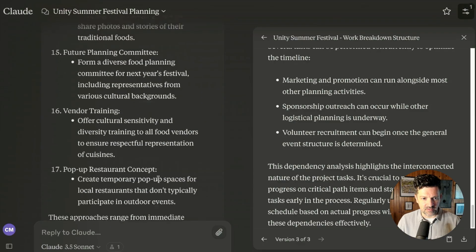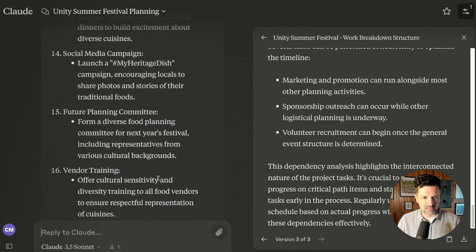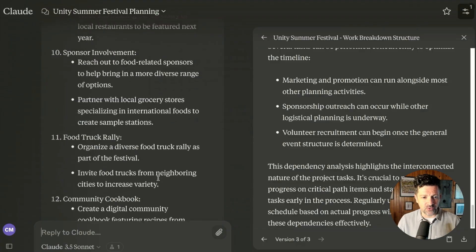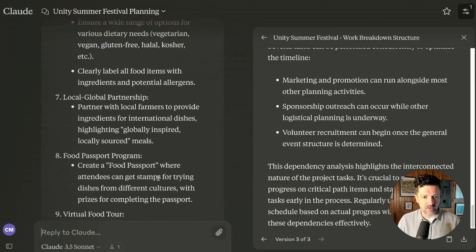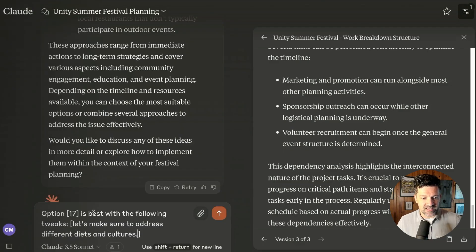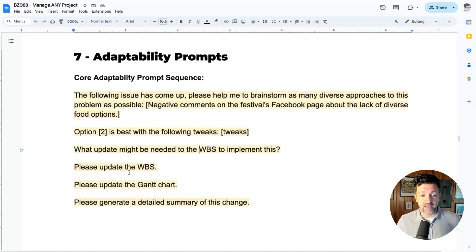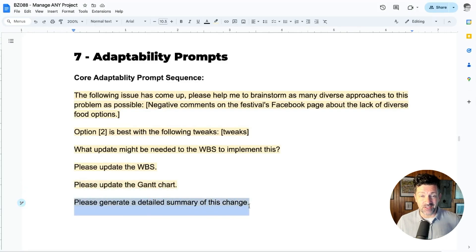It gives us a lot of different ideas: a pop-up restaurant concept, a new social media campaign, a community cookbook, a food truck rally — a lot of awesome ideas. I select option 17 with some tweaks: make sure to address different diets and cultures. From there, you may need to update the original WBS and your Gantt chart using a simple prompt. Then we take this detailed summary of the change and communicate it to our stakeholders so they're informed of what we're doing about the problem.